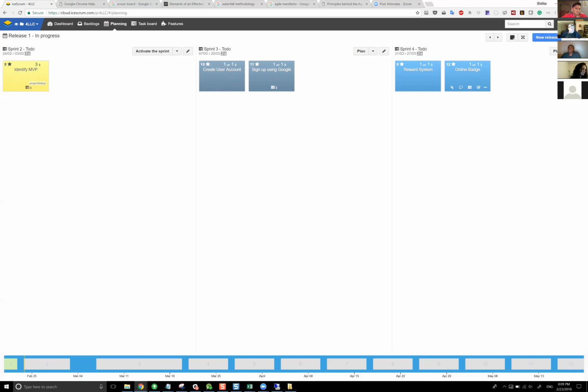Typically, though, what we do is plan 1 or 2 sprints ahead, because we want to be agile enough to where we're not so planned ahead that things just become discombobulated when we want to move this from 4 sprints ago from now. It's better to leave things on the backlog until you're ready to move them up.